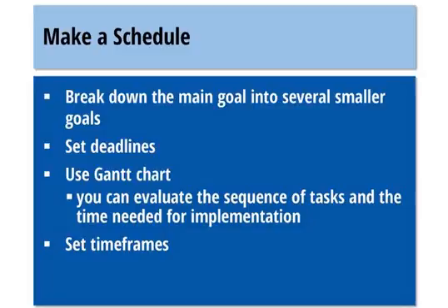Drawing up a set of proposals on townhouses will take about 4 months and can be ongoing alongside other project tasks. Let's also assign 4 months for signing contracts with developers when selecting townhouses. A marketing campaign can only be launched after writing the proposal for clients, otherwise you won't have anything to advertise or promote. Let's set aside 2 months for that on our chart. You can start working with clients simultaneously.